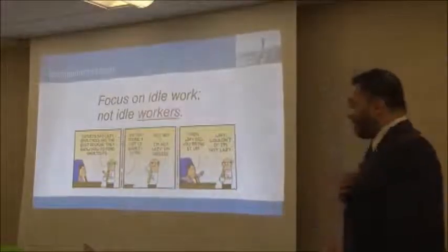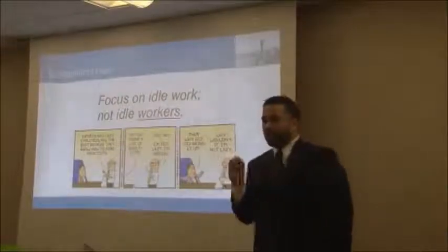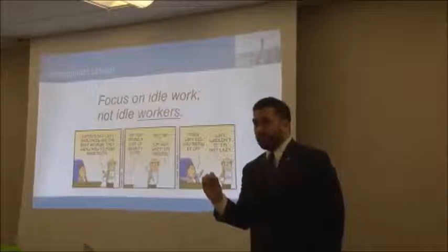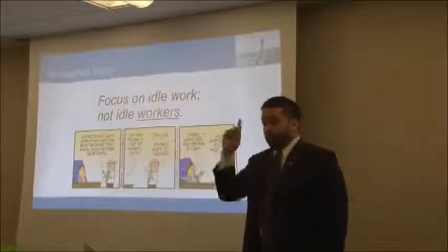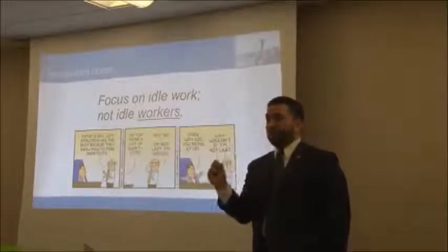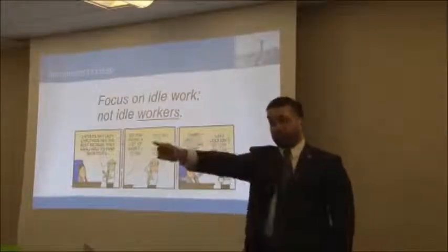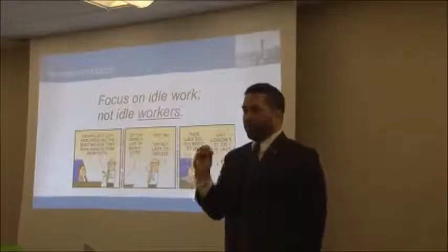And so the idea is, though, you don't care about, or you shouldn't care about, individual workers at that level. What you should care about is work not getting done. If people want to surf Facebook, have at it. The problem is, you need to make sure work's getting done. I don't care about what individuals are doing. I care about the work that's there in process and that it moves through the flow. That's what matters. So focus on idle work and not idle workers.